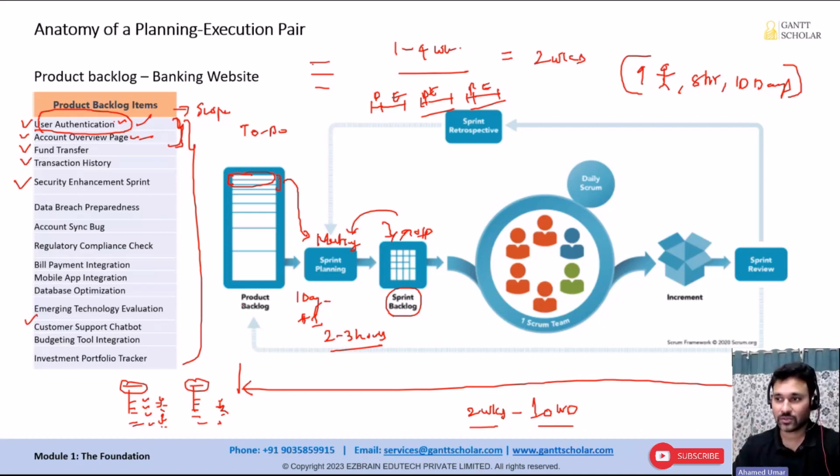Okay, so remember, what's the difference between a product backlog and a sprint backlog? If someone asks you in which document we maintain the project scope in Agile, your answer should be product backlog. For every iteration or sprint, what would be your team's plan, where you capture that plan? So we will capture this planning in the form of sprint backlog, okay, or otherwise called iteration backlog.